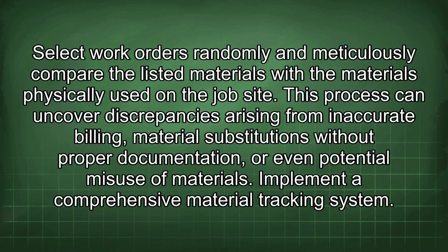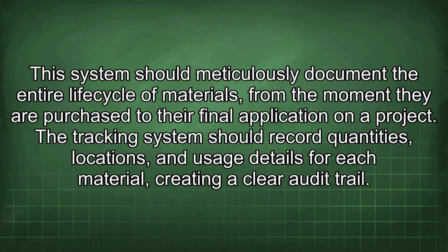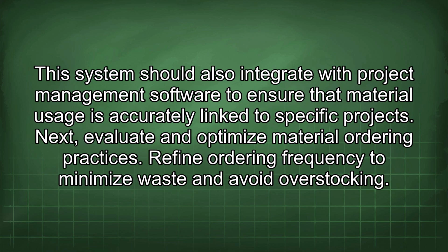Implement a comprehensive material tracking system. This system should meticulously document the entire life cycle of materials from the moment they are purchased to their final application on a project. The tracking system should record quantities, locations, and usage details for each material, creating a clear audit trail. This system should also integrate with project management software to ensure that material usage is accurately linked to specific projects.